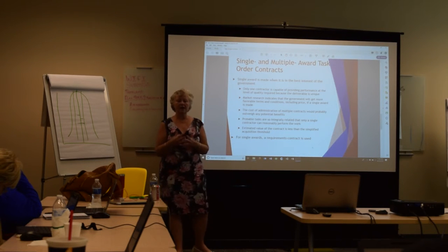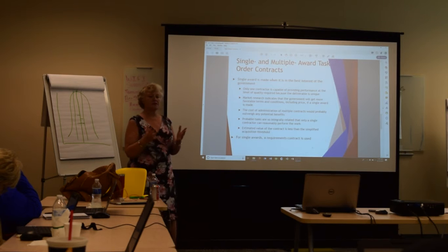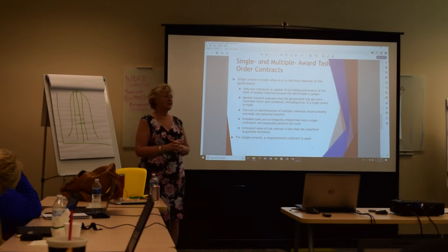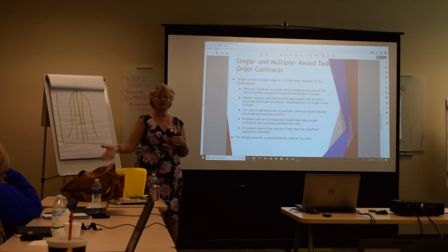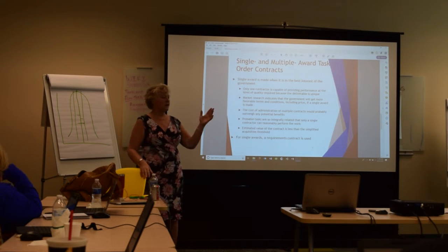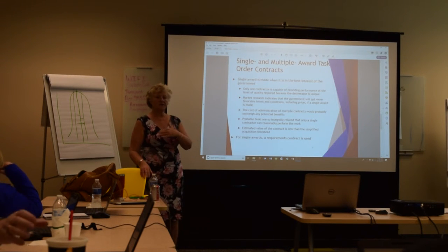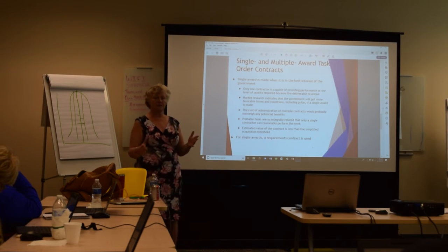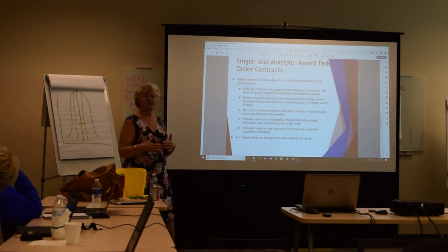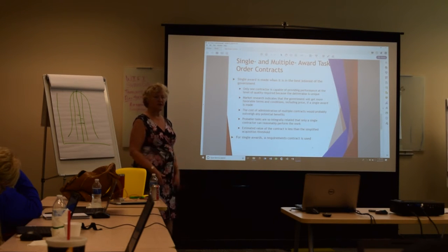Like, maybe your average bill rate is $150 an hour, and you say to the government, if you do a single award and I get the award, I'll lower this to $100 an hour. And then the government looks at, well, she's charging $150, and these other companies are at $125, $119, but she'll take it down to $100 if she does the whole thing. When they do market research and they discover that, they could decide to go with a single award.